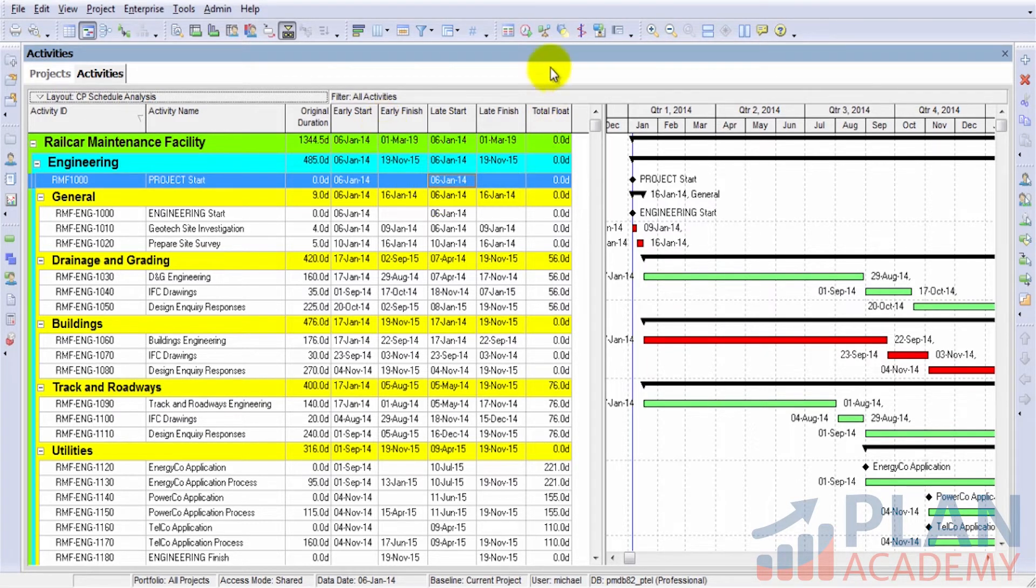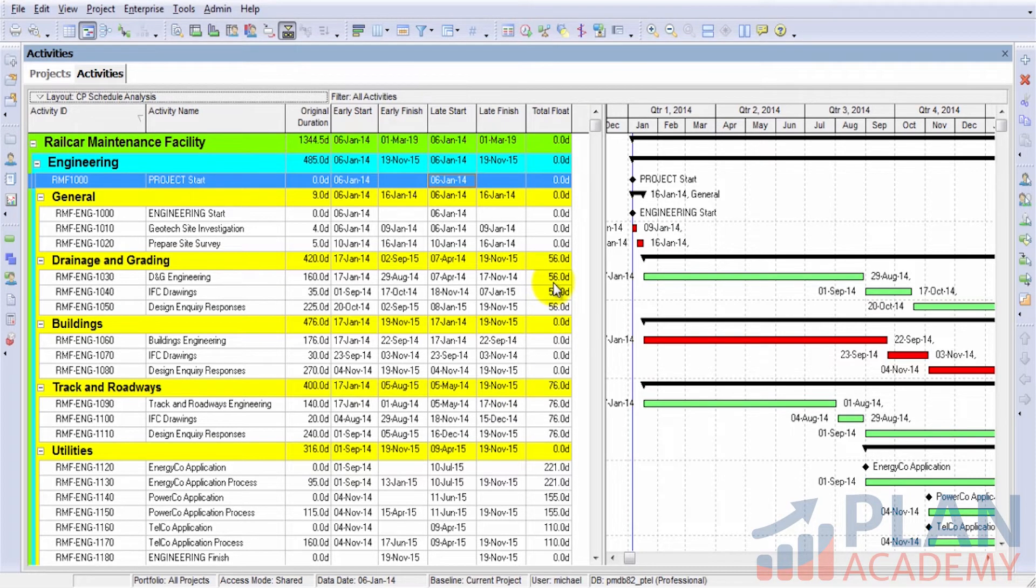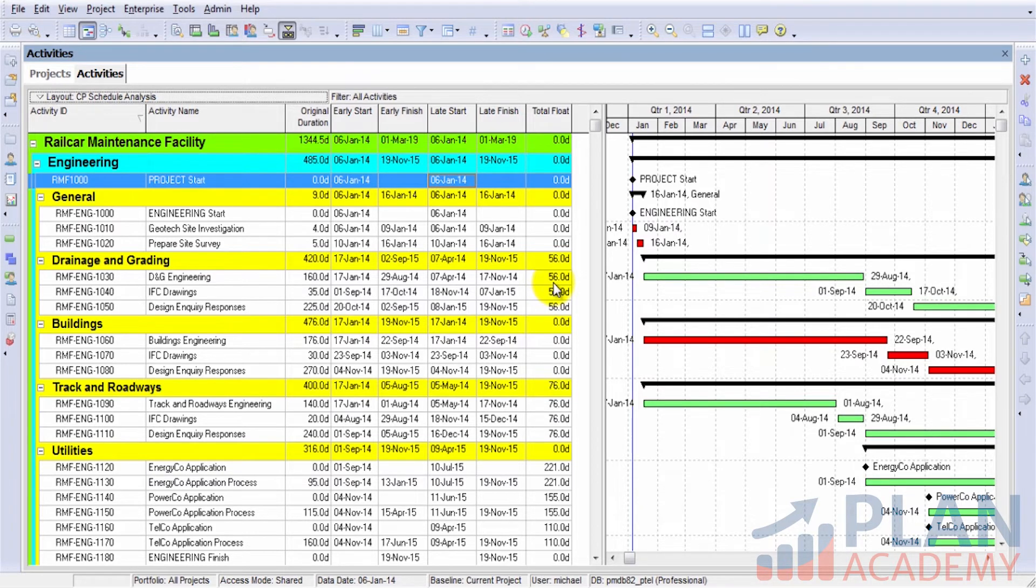We also have our total float field. And if you recall, total float is the difference between, say, the late start and the early start date, or the late finish and the early finish date. They calculate to be the same thing.